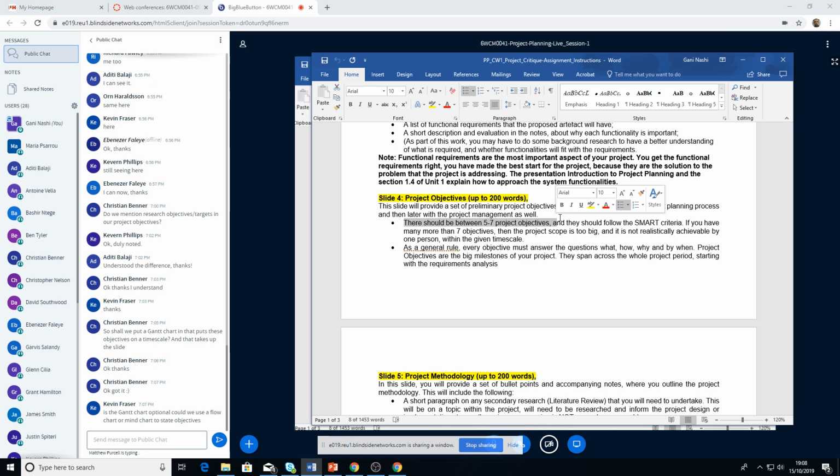Then you start looking at the tasks in a graphical way. Then you realize, why am I waiting for task 1 to start task 2? They're not dependent, so I can do them in parallel. So the Gantt chart will be slightly different from the project schedule that you created in the beginning, because you'll change the dates. Sometimes you put some tasks together that run in parallel. Now with the Gantt chart, I have a full project plan and I can start the work now.